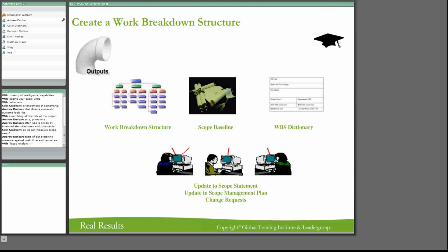For each work breakdown structure component, the work breakdown structure dictionary includes a brief definition of the scope or statement of the work. It defines the deliverables. It lists the associated activities and the list of milestones. Other information may include the responsibility organization, the start and end dates, the resources required, an estimated cost, a charge number, contract information, quality requirements, and technical references to facilitate the performance of work.